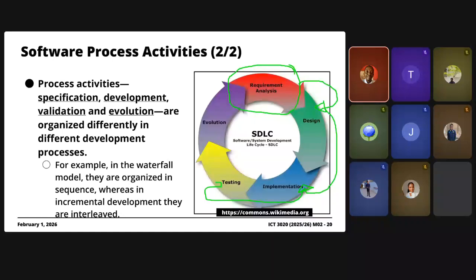One of the things you have got to do early on, before you even start serious development, if you're using a waterfall model, is agree with the client: we are done with requirements, and this is the list of requirements that we have gathered after interacting with the key stakeholders. Please sign off and indicate that we have captured all the requirements. And usually that sign off is tied to some payment. Usually they'll say, we'll pay you 20% after you're done with requirements or something like that.